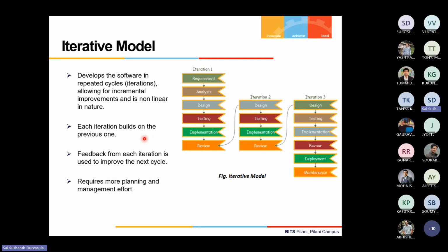So what they have realized is, let's have a deliverable more frequent than this 6 months or 1 year long time frame that we are trying to have. And that is where they came up with small life cycles of the same waterfall model. If you see, this is also waterfall only, but it's just a very small one, meaning instead of having, let's say, 20 requirements, you bring it down to one or two requirements and then do the whole cycle, right? And repeat this any number of times you need. So those are called iterations.